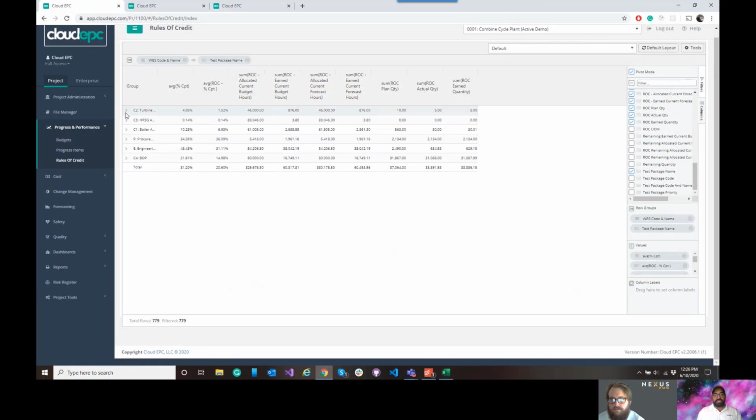I mean, depending on how you take off and what information is available in your ISO, you know, boiler elevation 350, you know, X amount of pipe, X amount of tray, X amount of electrical, you can really get some comprehensive data that you can pivot and slice in this view and then save that off as a layout to be able to answer some complicated questions and also coordinate between the phases. What portion of engineering boiler area elevation 300 are we engineered versus procured versus installed, depending on the level of data that was available and the coding structures that were implemented.